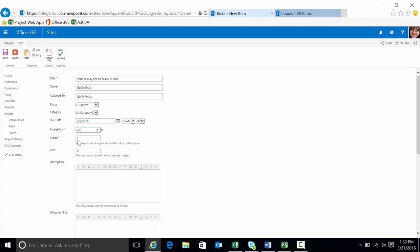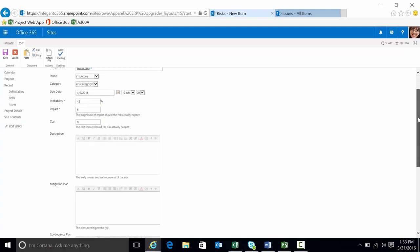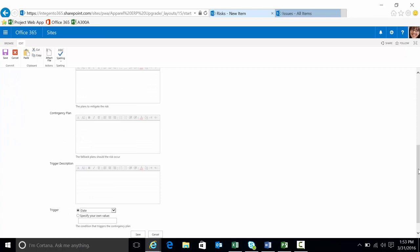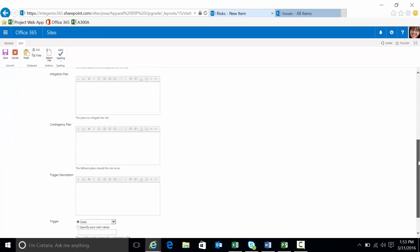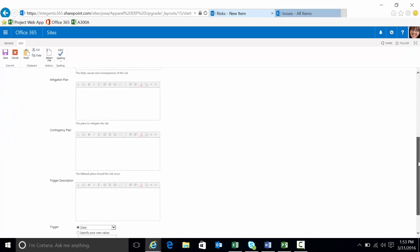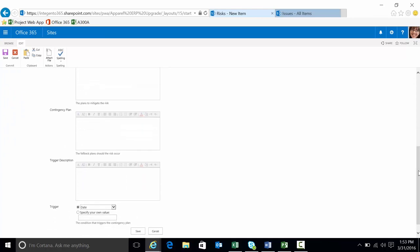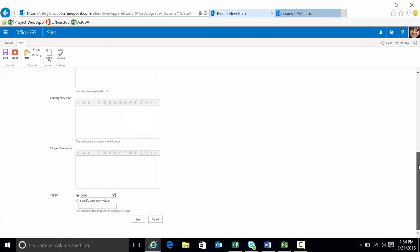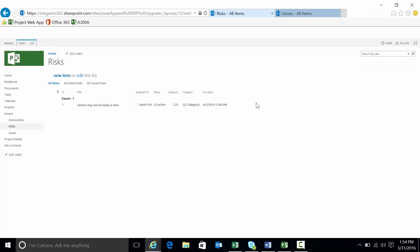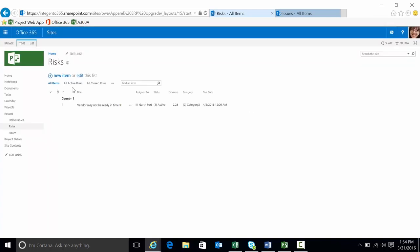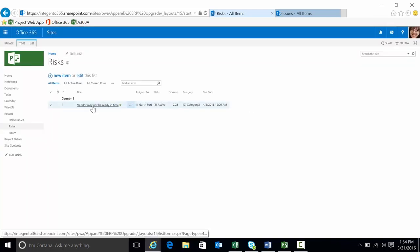Probability of this risk item occurring. Impact. Cost. You can provide a description of what the risk would be as well as a mitigation, contingency plans and a trigger description. What would be the event that would have to occur for this to actually turn into an issue. And then ultimately I can save this thing. There's my one risk item.